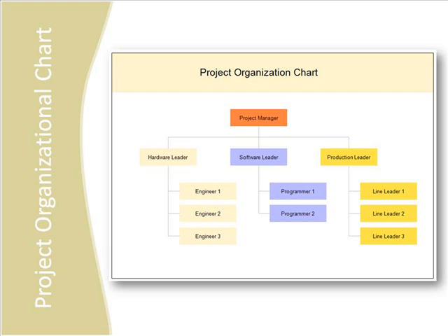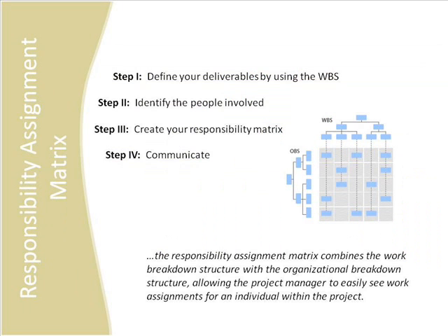The project organization chart is a tool used by team members and leaders to keep a thorough organizational record of the project's processes. It is effective in the attempts to thoroughly track and record the actual deployment processes that have been implemented within the scope and any particular relationships between project members throughout the project. One useful tool that project managers use to keep these assignments clear is the responsibility assignment matrix. The matrix matches the project deliverables with the people who are responsible for them. For every piece of the project, the matrix shows who is responsible for that component or aspect of the project.